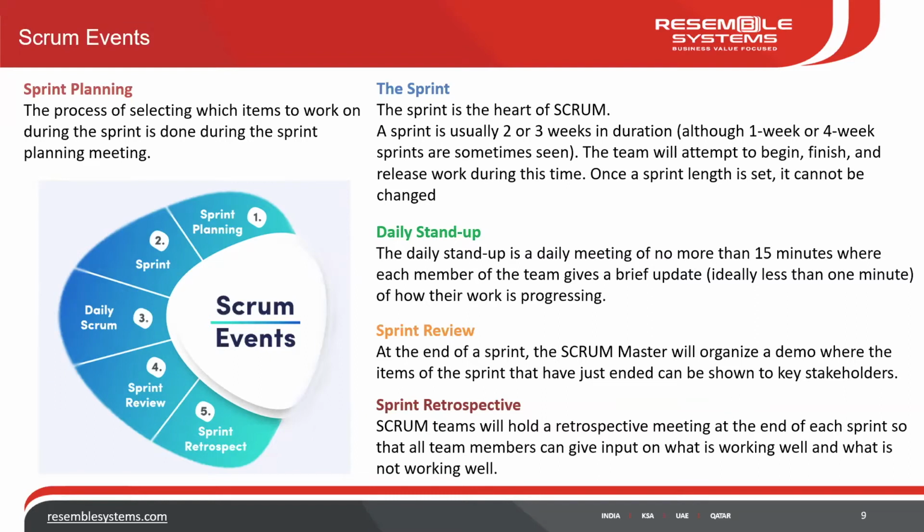Now, next is the daily stand up, which I told you about. The daily stand up is nothing but a meeting which happens for 10 to 15 minutes, where each member of the team gives a brief update. What did he do yesterday? What happened today? And what is the plan for tomorrow? And not only just inform what is going on, what his work progress is like, but also if there are any challenges or issues, they immediately speak up. See, this is where the collaboration comes in.